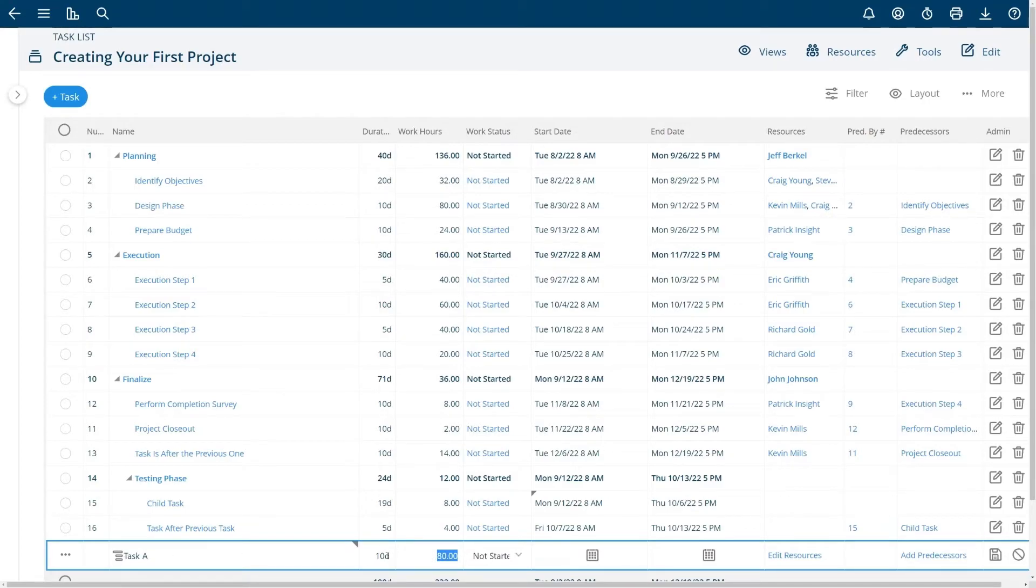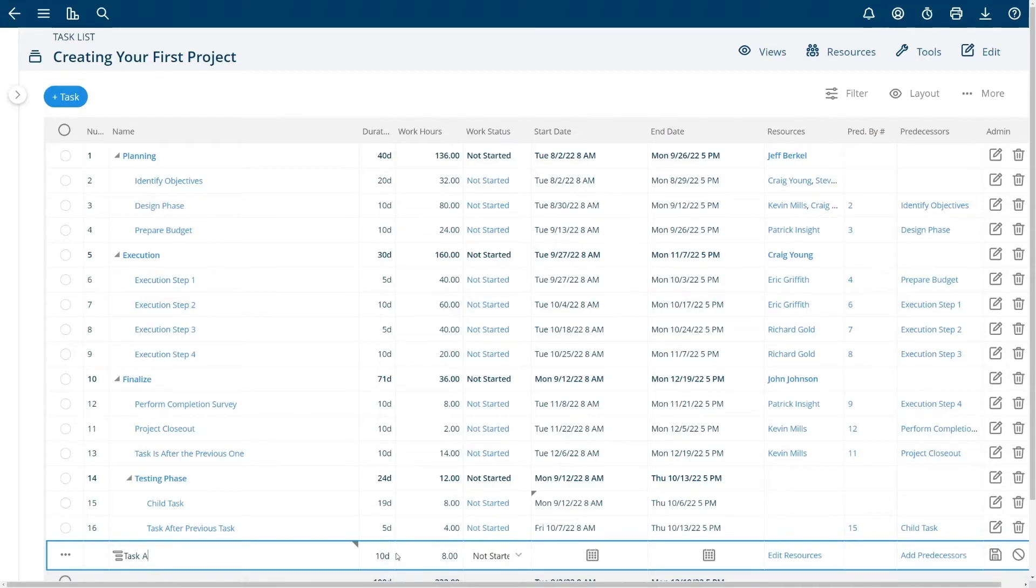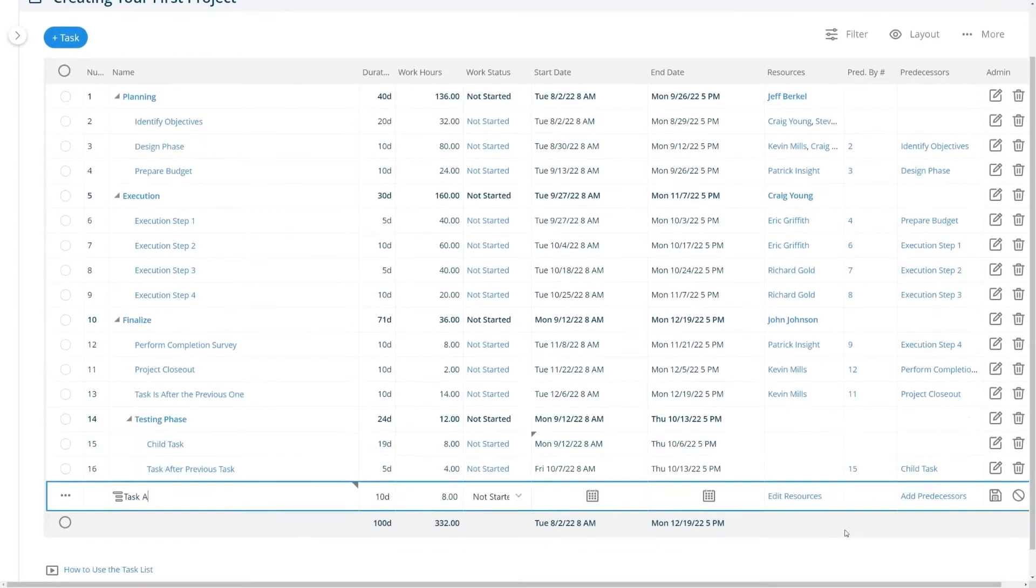This task we may give someone 10 days to do it but it's really only eight hours of collective work. Meaning if they sat down and did the work for eight hours it would get done but by making it take 10 days it gives them a little bit of slack in the schedule because the reality is not everybody can do everything all at once. Most tasks you want to give some duration and effort. Those are two different concepts.